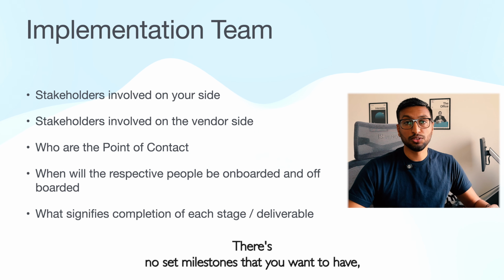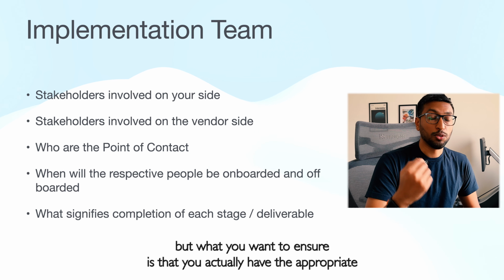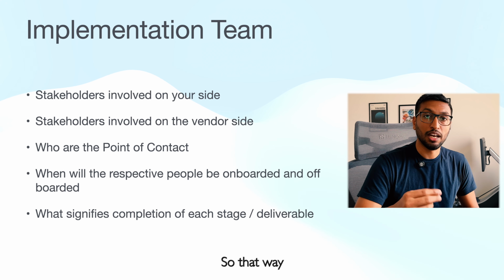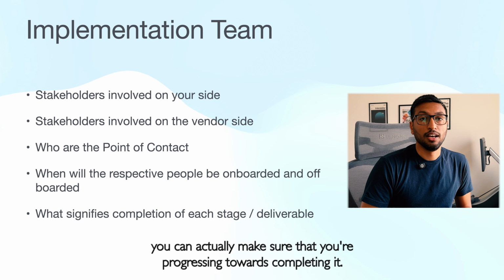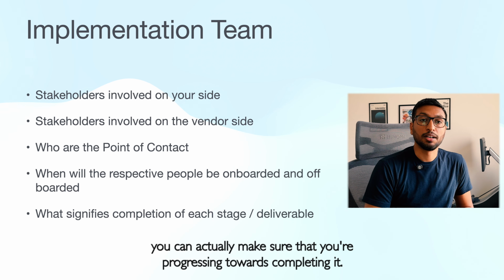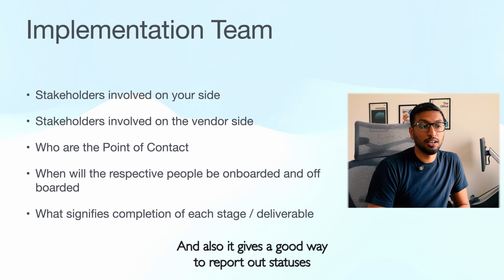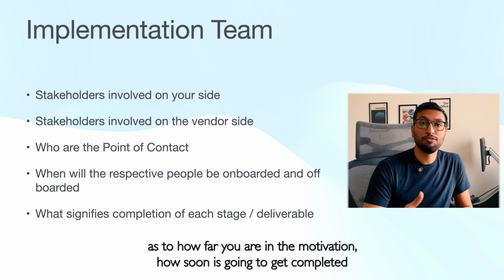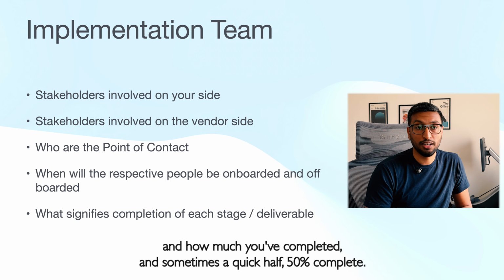So again, the milestones can vary. There are no set milestones that you want to have, but what you want to make sure is that you have the appropriate checkpoints within your milestones, so that you can make sure you're progressing towards completing it. It also gives a good way to report out statuses, because, and I'll go into the communication piece, you really want to keep people apprised as to how far you are in the implementation, how soon it's going to get completed, and how much you've completed.